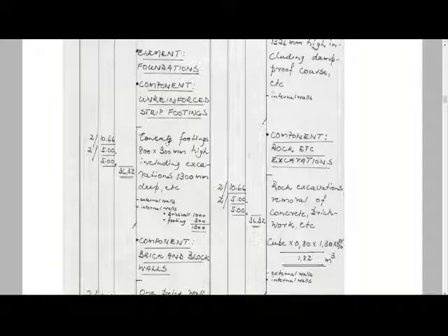For instance, if you measure the length of your brickwork, you can use it for your plaster. If you times it with your height, you can easily get your plaster area. If you measure, for instance, your window openings, you can use those dimensions again for your openings in your brickwork, and so on.